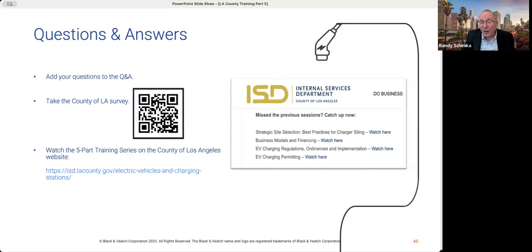And like you said, there are standardized signs that a lot of people use, and that way they don't have to do the design themselves. And sometimes too, the follow-up signage is that the municipalities are allowed to install as well. The site host would not be able to install those signs. They would need to have the permission from the city, because the follow-up signs, a lot of times you'll see them placed on street lights or near other signs. So you would need to get approval from your municipality to do that as well.